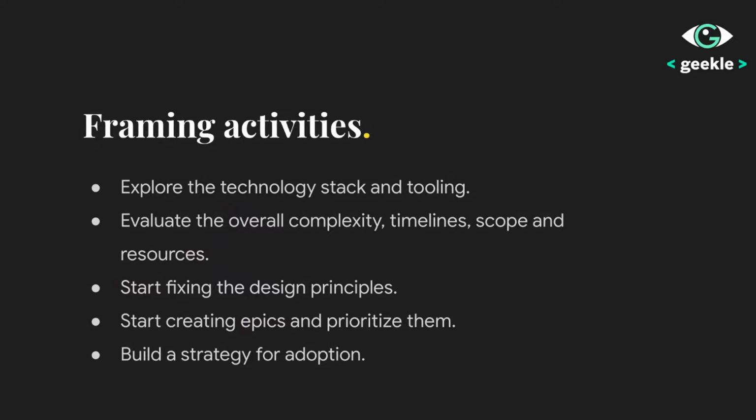The activity you do in framing is you explore the technology stack and tooling around it. You evaluate the overall complexity, timeline, scope, and resources you need. You start fixing the design principles, what sort of design principles you'll be needing, and you start creating epics and prioritize them the way you want to deliver and build upon. And you also build a strategy for adoption, which is very important.